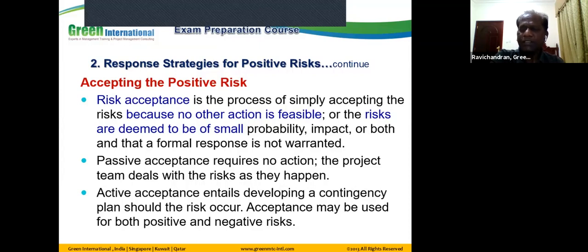So we analyzed it and saw there was a benefit in using the district cooling system, so we decided to implement it for our project. We redesigned the whole development again. When we went through this exercise, we analyzed the risk involved in this decision. We saw it was a small probability, not even 20%, only 10 to 15%.